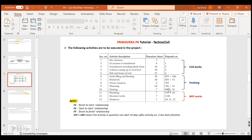In the case of painting, it has a start-to-start relationship with a nine-day lag. Painting is related to activity nine, which is plastering. So nine SS means it has a predecessor of plastering — plastering is the predecessor of painting and it has a start-to-start relationship. That means painting will start only when plastering has started. Obviously you cannot start painting without plastering, but once the plastering has started, you can go ahead with the painting on the plastered area. This is called a start-to-start relationship.